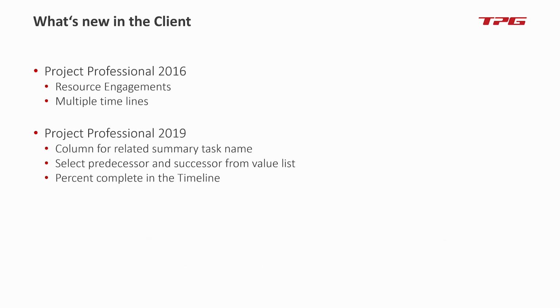You have percent completion in the timeline. Again, it's really minor adjustments. You still have, of course, multiple timelines, and you can add the percent completion information into the timeline, which I think makes a lot of sense. Yeah, why would you look into a timeline if you don't see where you are, for example? And finally, we have different labels for the timeline. So you could label them top-down milestones, reporting milestones, phases, deliverables, and have, for example, 4 different timelines set up in a given schedule that all show different pieces of your entire project schedule at a nice roll-up of a timeline. Yeah, just as a starting point.